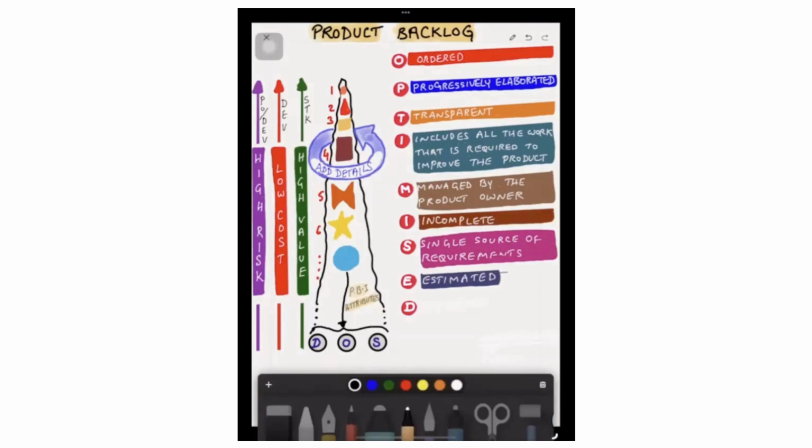So the first opportunity for the estimation is product backlog refinement. If they miss, the next opportunity is sprint planning. I recommend to, as much as possible, estimate the product backlog items in the product backlog refinement by talking to the product owner, get all the clarifications done, and then if the item is too big, make it into smaller granular items, discuss the acceptance criteria, identify the dependencies, and then estimate in the backlog refinement.